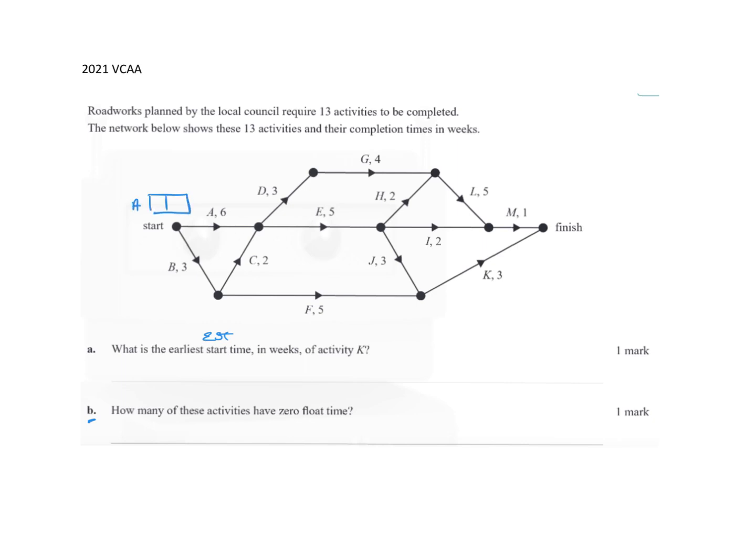So we've got activity A, and we have activity B, and I've got a starting time of 0. They're both at the start. And then I get to here, I might call this one D. So we're moving into D, it's come along A. So at the moment, I'm just going to say coming along A is 6, because we've got to remember we could come this way. So 3 plus 2, if I came via this C, it would be 5. So 6 is the biggest. And then I'll just rub out those little numbers. Now, I've also got E coming out here. So E also will be 6, because that's at the same spot.